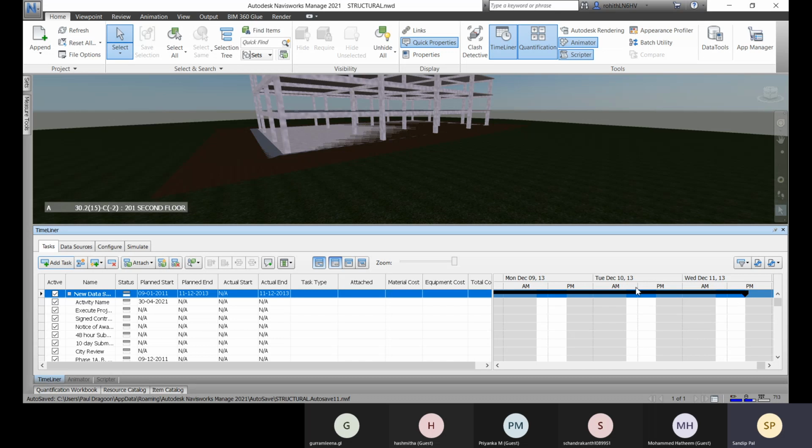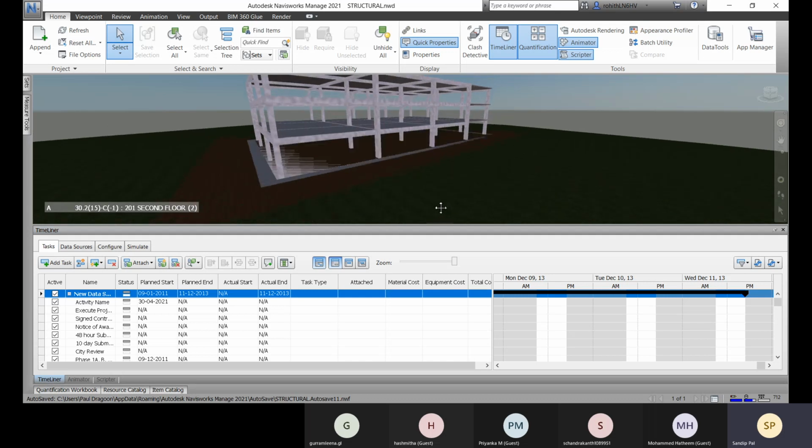All right. And here you have this export schedule. So you can export this Gantt chart, this schedule, as a CSV file or as an MS Project XML file. Okay, you can export it. All right, so this way you will be creating your timeline or simulation, your 4D simulation, and you can see it.